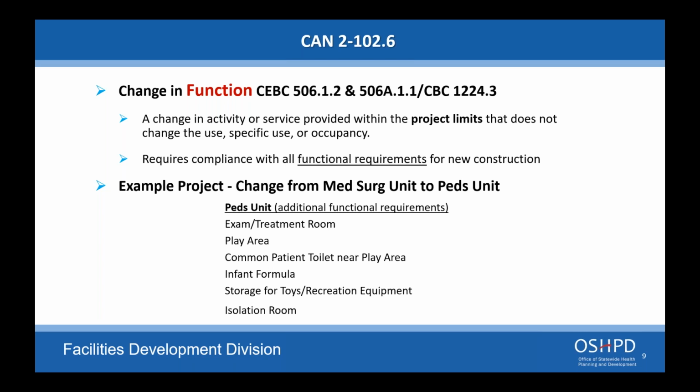So Richard, replacing a cooling tower that failed, what is the implication to structural upgrades beyond the scope if we only have a few members needed to be added at anchorage points? Well, if it's failed, I'd definitely be contacting your compliance officer or RCO to talk about it, because it's probably gonna be an emergency project. Which item is this? Okay, I see it. Yeah. Structurally, you do need to anchor it, and it has to be secure.